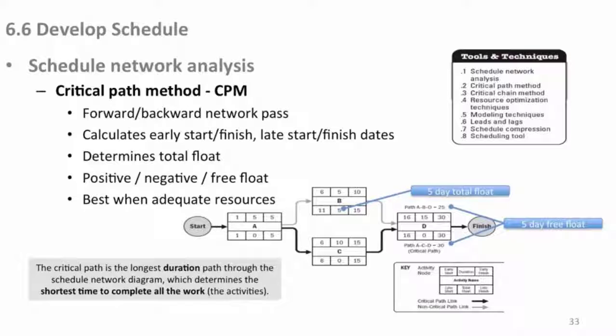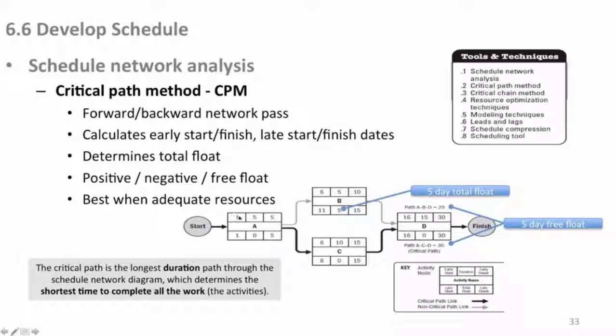Now this is one of these scheduling methodologies you could use, and that is the critical path method here. There's also critical chain, and there could be others, but this is the one that is primarily used in most shops. The way you calculate critical path is you start here, you go through here, you can see here's your template, early start, early finish with a duration. So here's our durations here in the middle that we've estimated will take that task A. So it takes through here, through B to here, and you finish over here, and then you go backwards for the ones down here, which are your late start, late finish. You do it down here. And there's a method and a madness to the way you calculate the stuff. You can do it by hand.